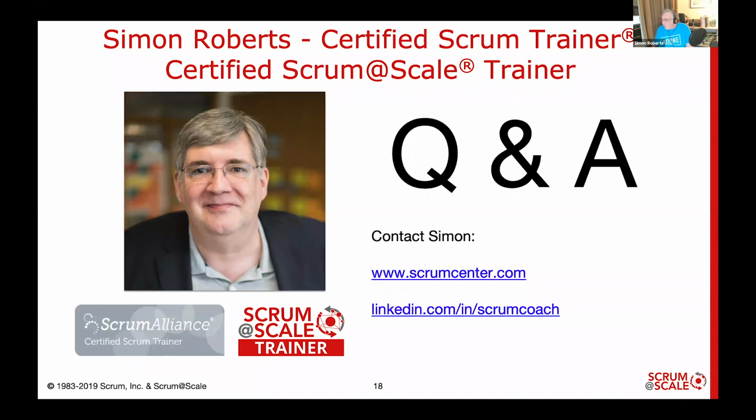It's an innovation game where basically you can figure out what's the available capacity we have for this next release of the organization. We could call it gummy bears, or we could use a scale of gummy bears or story points or whatever we like. In advance, we have to get people to estimate the relative size of different initiatives, and then we distribute money to the senior leaders. Monopoly money is great.